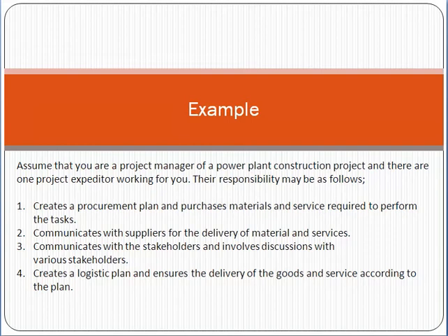Their responsibilities may be as follows: create a procurement plan and purchase material and service, communicate with the supplier for the delivery of material and service, communicate with the stakeholders involved, create a logistic plan, and ensure the delivery of the goods and service according to the plan.